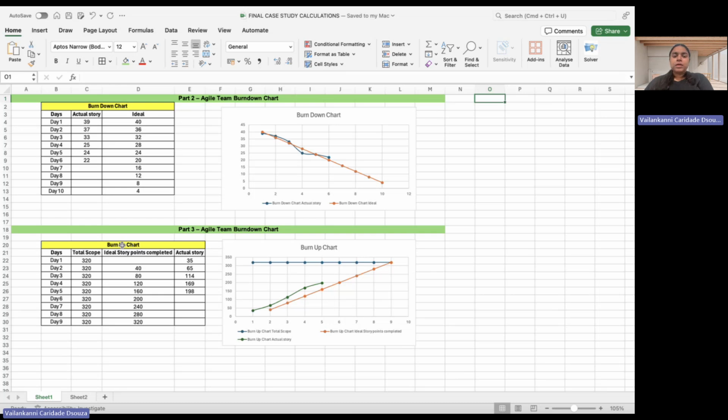I would recommend backlog grooming to ensure tasks are ready, realistic sprint goals aligned with capacity, and knowledge sharing to manage absence or bottlenecks. There are risks too, such as incorrect estimations, team unavailability, and scope creep. These can be mitigated with relative estimation methods like planning poker, buffer planning, and tight scope control.